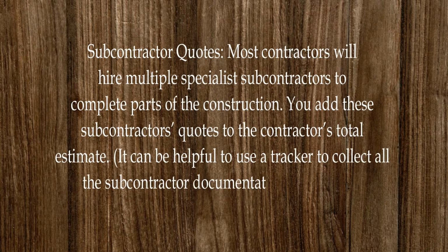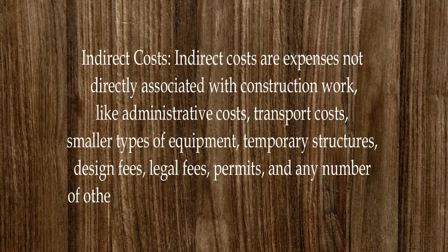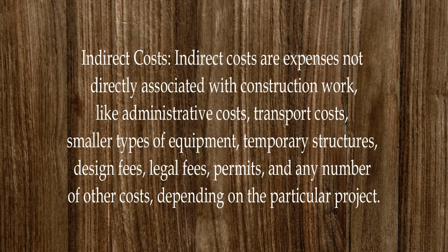Subcontractor quotes. Most contractors will hire multiple specialist subcontractors to complete parts of the construction. You add these subcontractors' quotes to the contractor's total estimate. It can be helpful to use a tracker to collect all the subcontractor documentation in one place. Indirect costs. Indirect costs are expenses not directly associated with construction work, like administrative costs, transport costs, smaller types of equipment, temporary structures, design fees, legal fees, permits, and any number of other costs, depending on the particular project.